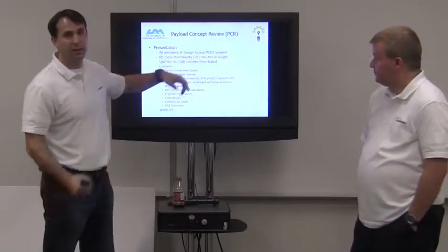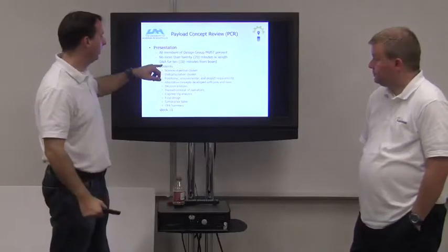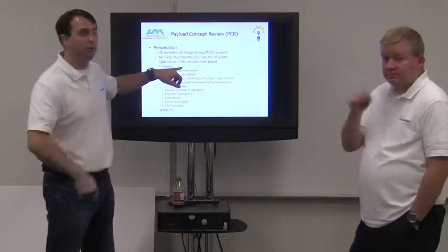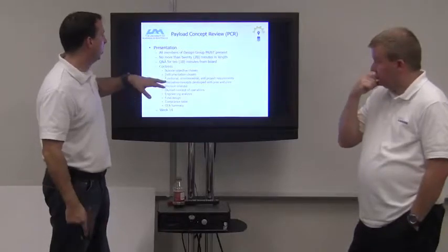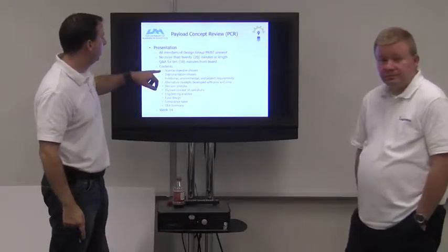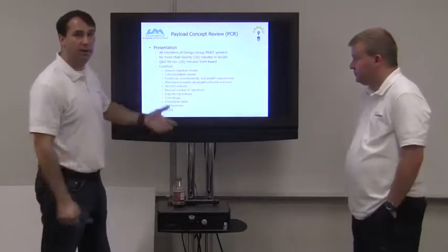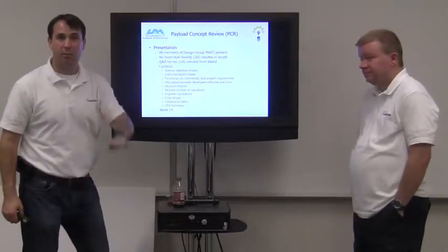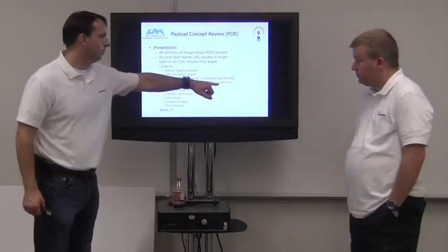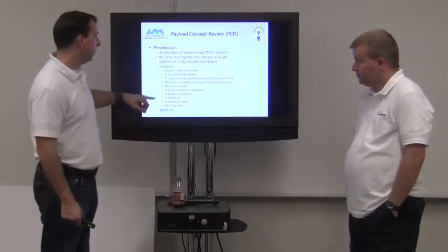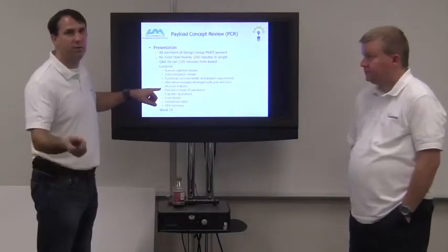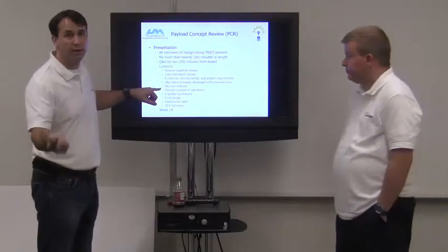No more than 20 minutes in length. So 20 minute presentation, total length, up to 20 minutes. Again, 10 minutes for questions from the review board. Content wise, it's going to be digital again with GoToMeeting, just like the last one. Content wise, it's basically what you did for the PSR plus some. So PSR was all the way down to alternative concepts with pros and cons. Now we're going to add decision analysis. So you've got these alternatives, these two or three ideas. Which one's the best one and why is it the best?